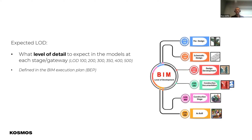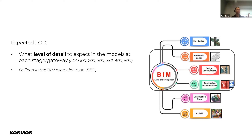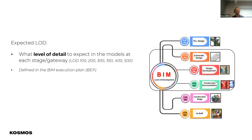The level of detail we'd expect at these stages is LOD 3 — roughly LOD 200 to 350 depending on the discipline. Different disciplines deliver information at different stages. MEP generally has very little design information at stages one and two because architecture and construction isn't locked down. They're really only at functional design, diagrammatic, and specification level. But now getting into these latter stages, you'll see electrical, mechanical, ventilation pushing on significantly in their level of detail and information within the models.